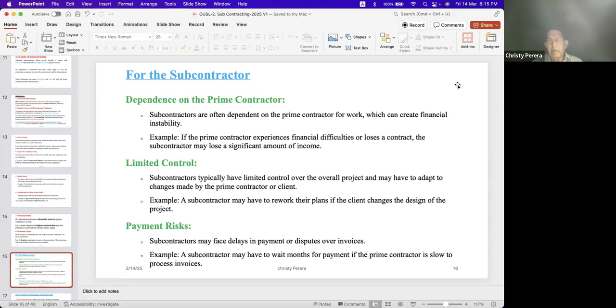They go behind the politicians, get the job and put in the subcontractors. They try to finish, but it doesn't succeed. Then the government or RDA, say for example the Road Development Authority, they don't pay. If they don't pay the main contractor, the subcontractors are in a problem.